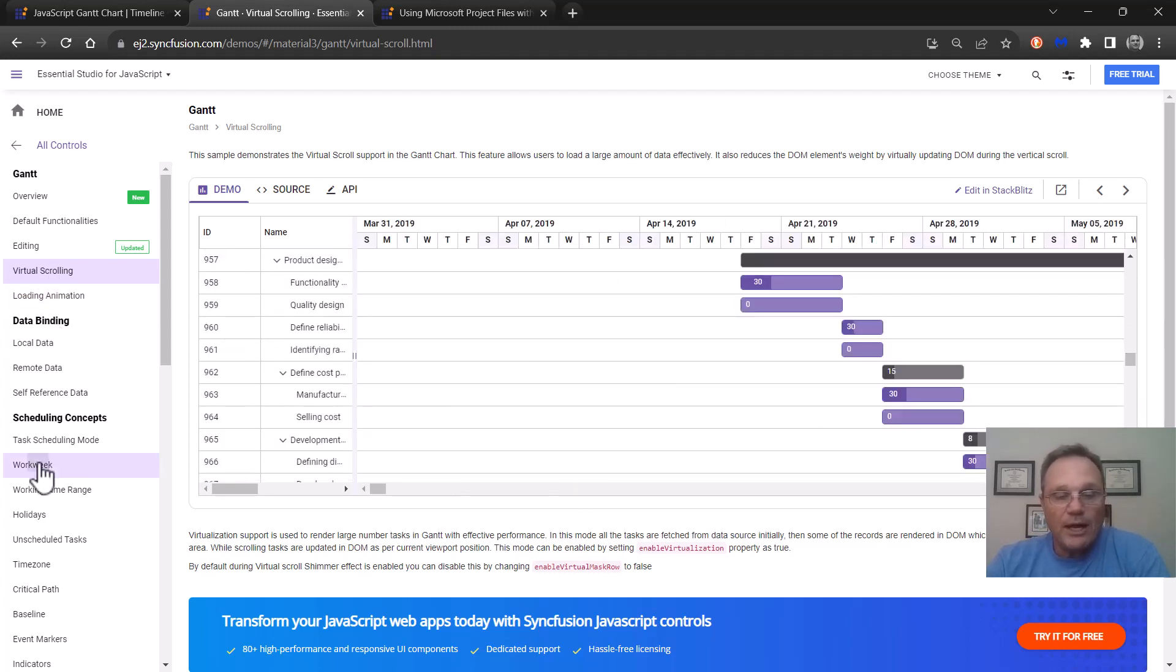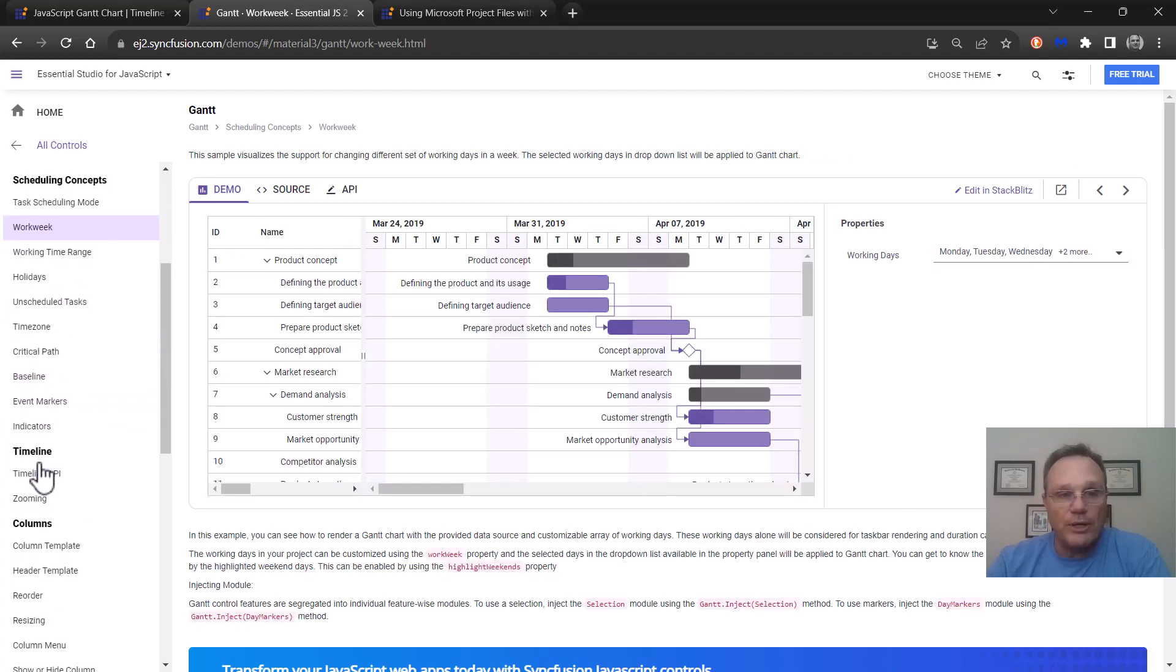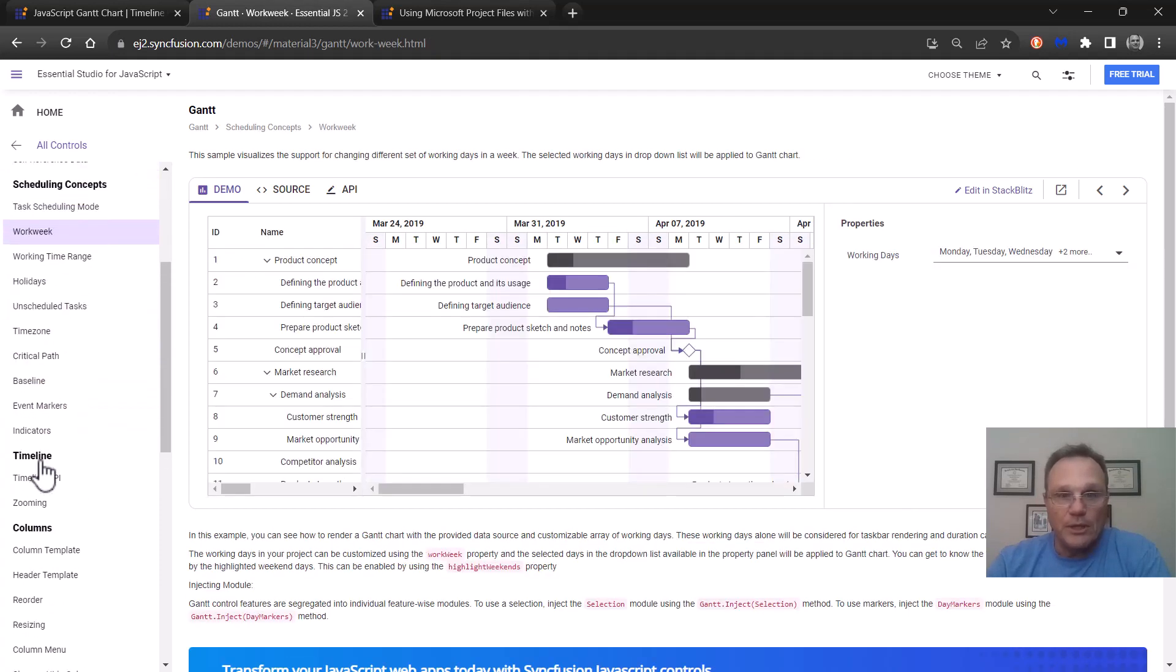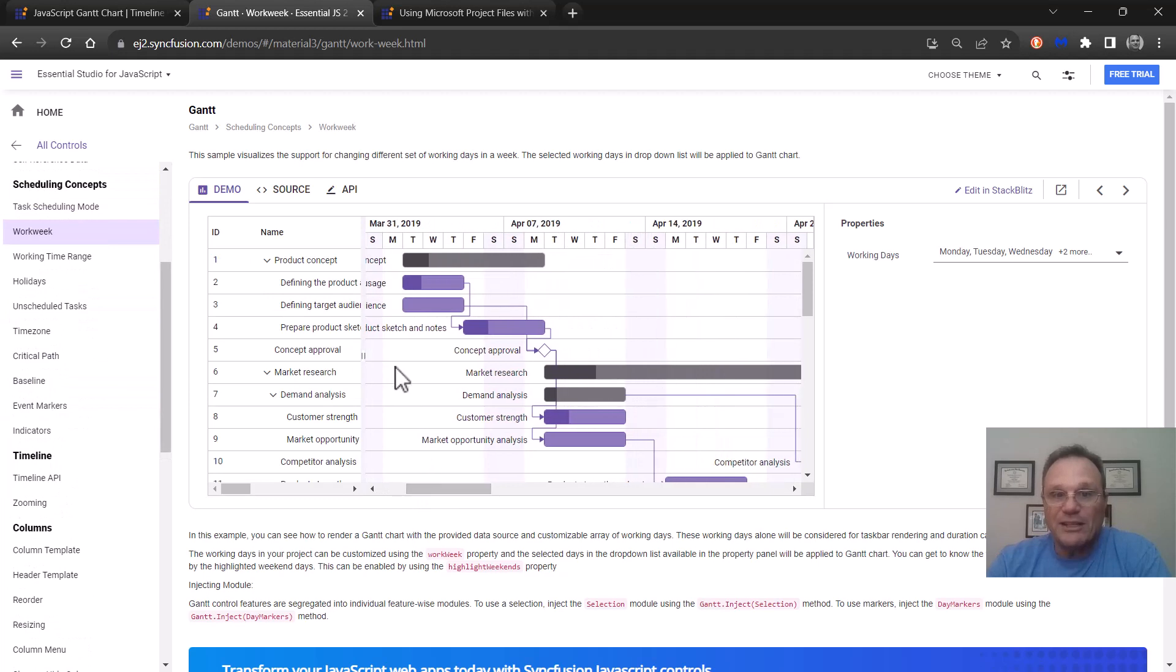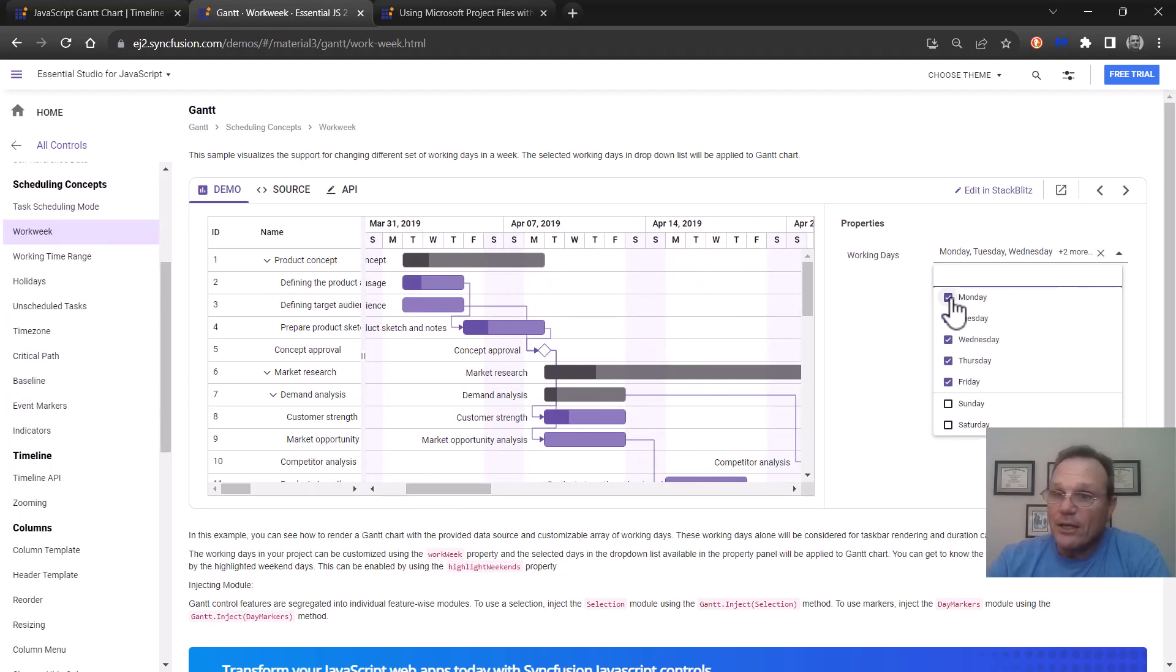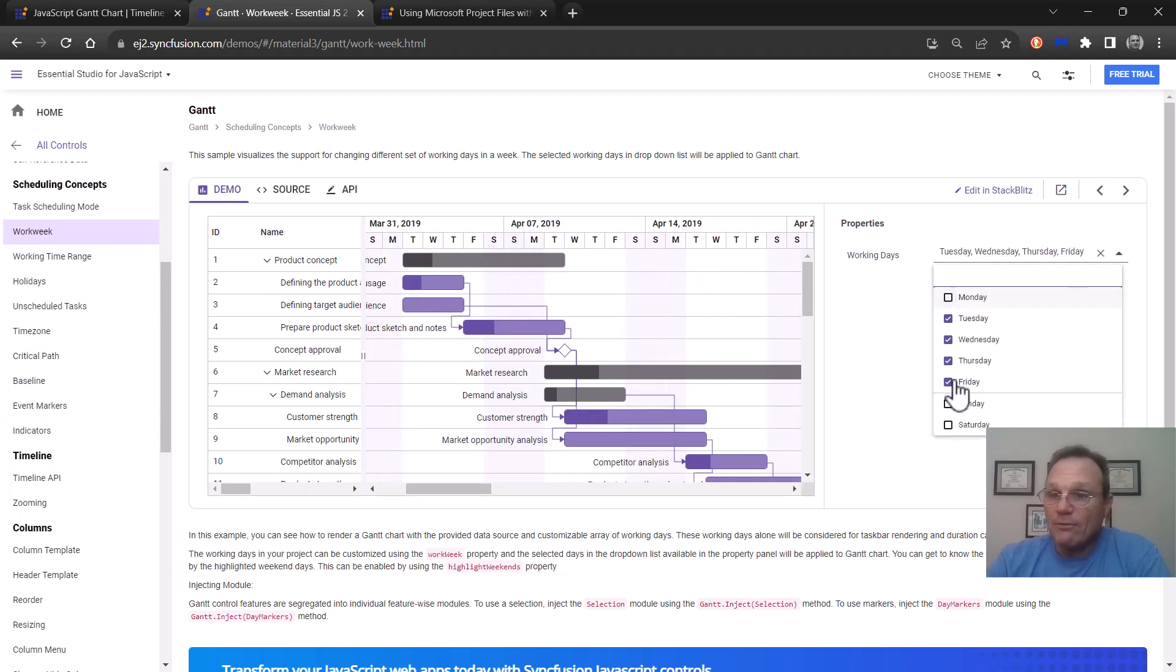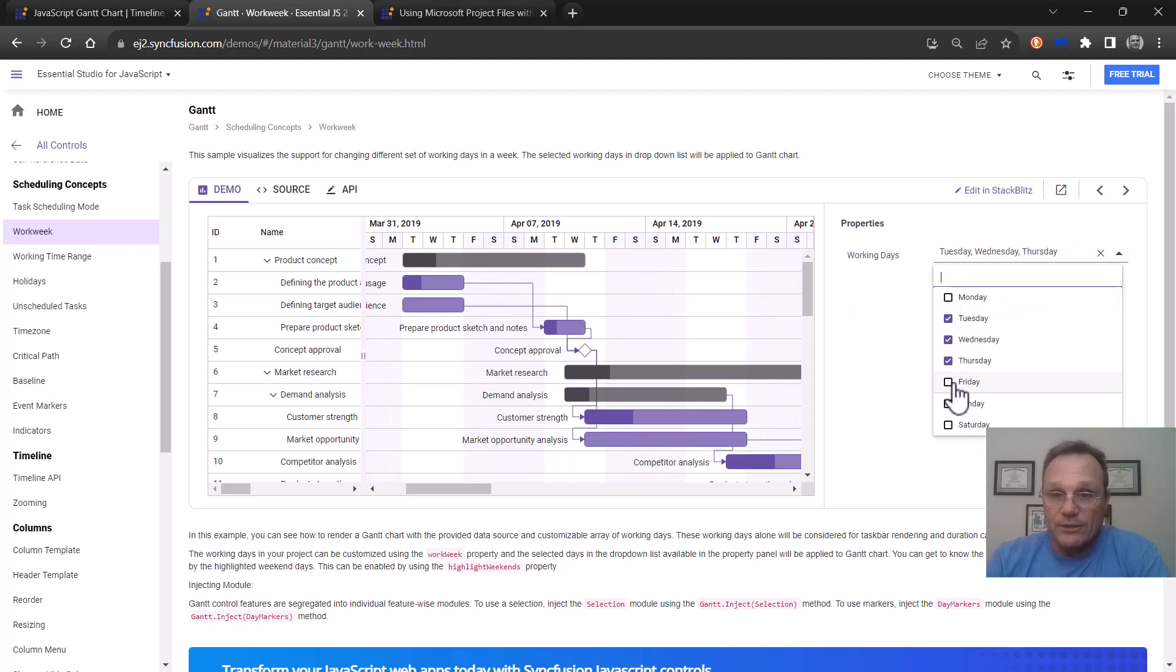We have a work week. You can define the work week to be viewed. So if you have a five day work week this particular Gantt is working on five days. If I decide we want to have four day weekends every week you can see the schedule expand.